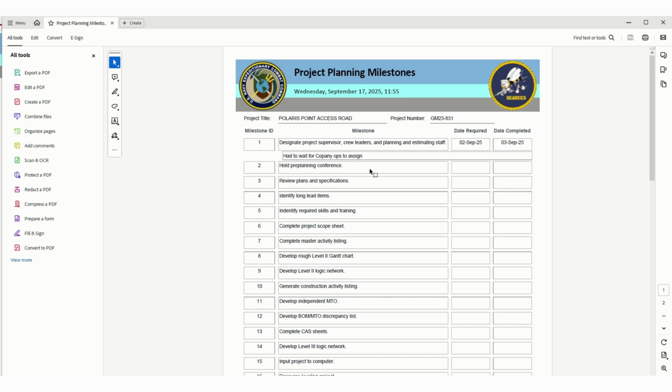As a regiment, as a group, we want you to always keep your original dates that you put as required, and the date you complete it to be actually when you completed it, and then just put a note why it took so long to complete. This will help us with training, manning, and equipping to see what the groups and regiments can help with as far as getting the support you needed or the resources your battalion needs to plan efficiently.